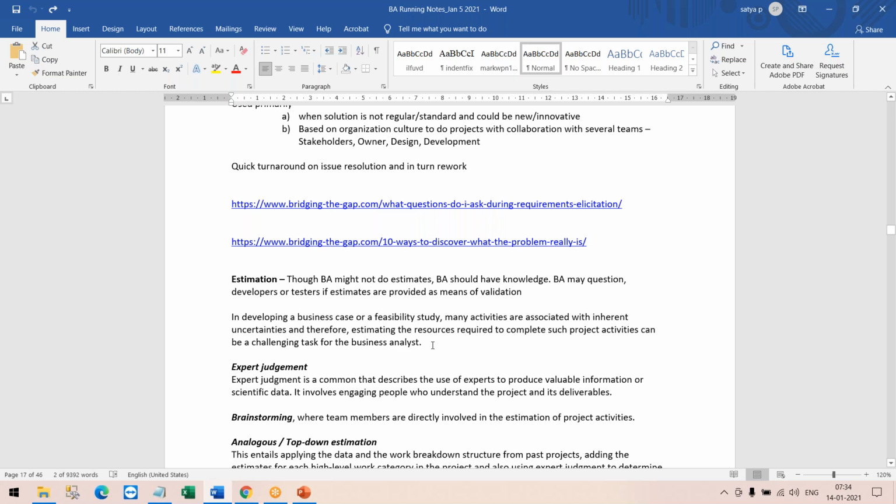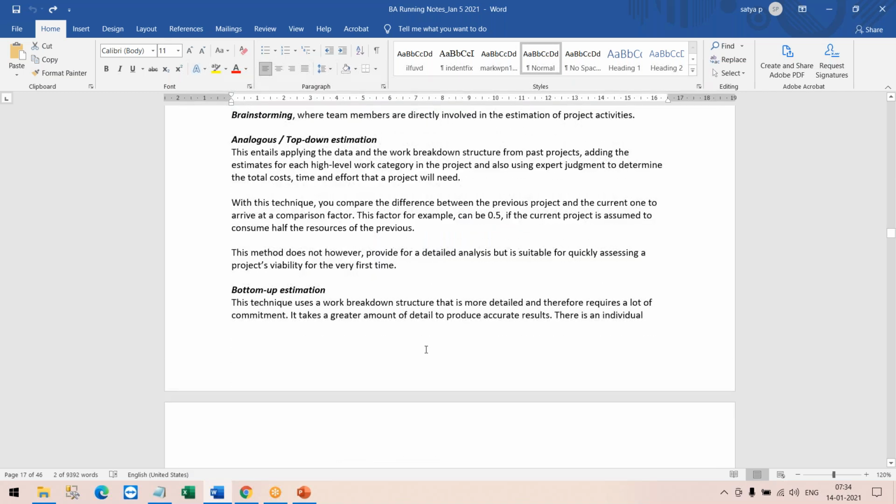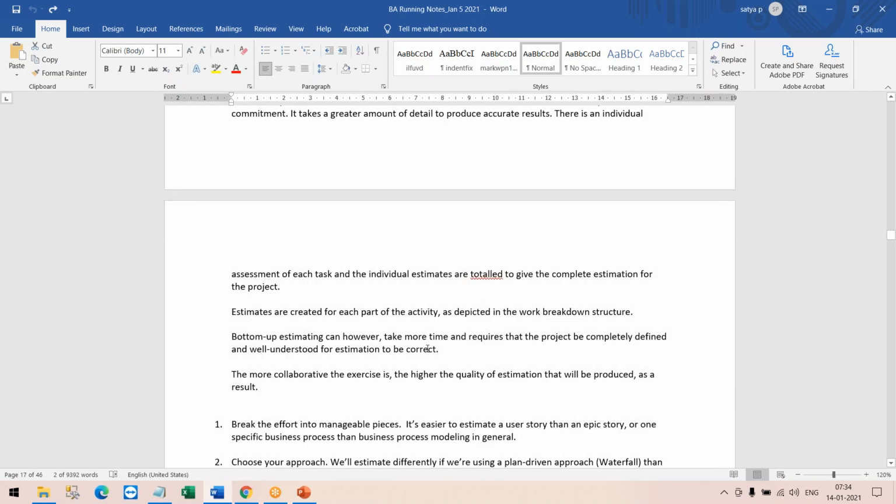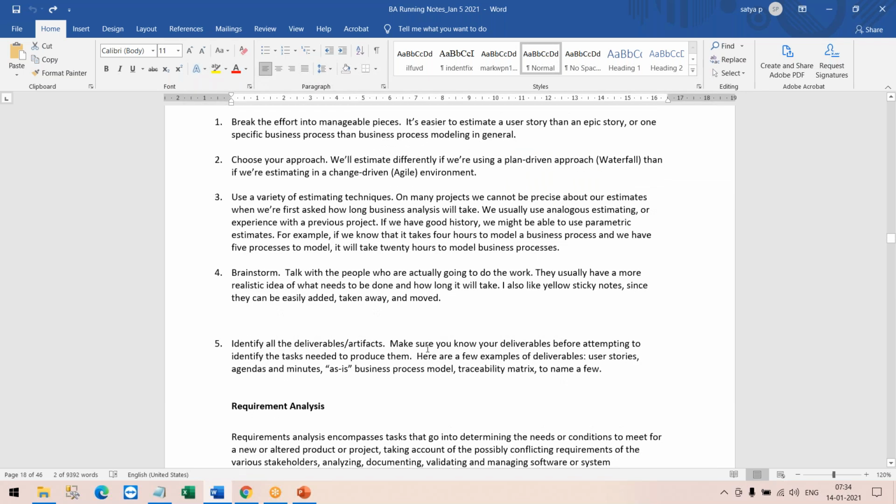So based on the tasks for the particular project, you break down your total task for the project, and for the different modules or applications inside the project as well, so you would estimate based on the specific criteria. You can go with the Delphi method, 3-point estimation, expert judgment. You can go with top-down estimation, bottom-up estimation, use the historical data for doing an estimation, or go with the software size. We studied different techniques for estimation, and then we studied requirement analysis. Do remember, every estimation we give has to be justifiable.